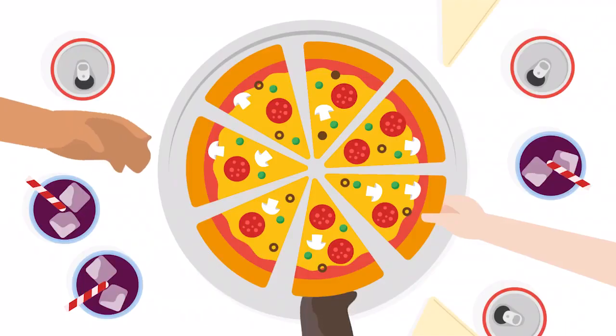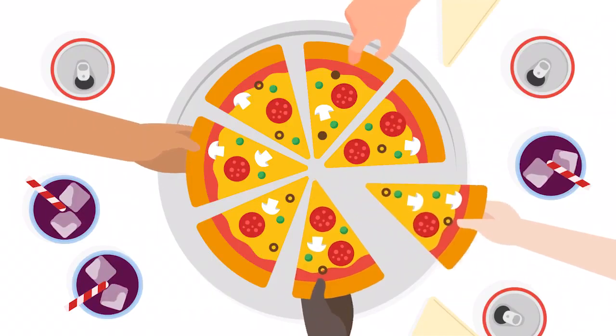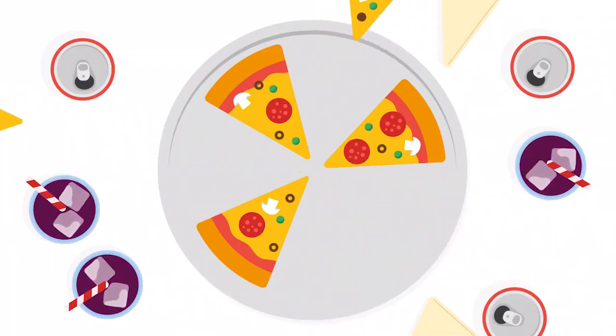Scrum lends itself best to the following types of projects and teams. Ideally, a Scrum team should be cross-functional, with around 3 to 9 team members. Some call this a pizza-sized team, because it has the same amount of people who could share a large pizza. If the team is too small, you might not have the diversity of skills to get work done. If the team is too large, it gets hard to distribute information.